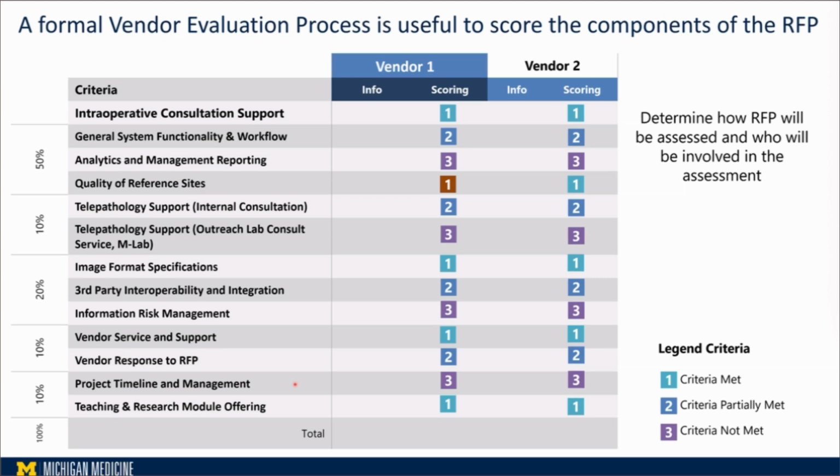And after that promised date, you have to put in the contract that if I'm going to have proprietary images that I have to implement after this point in time, then all the migration has to be covered by this vendor because they didn't meet the criteria, and we literally put it into account in the contracting.